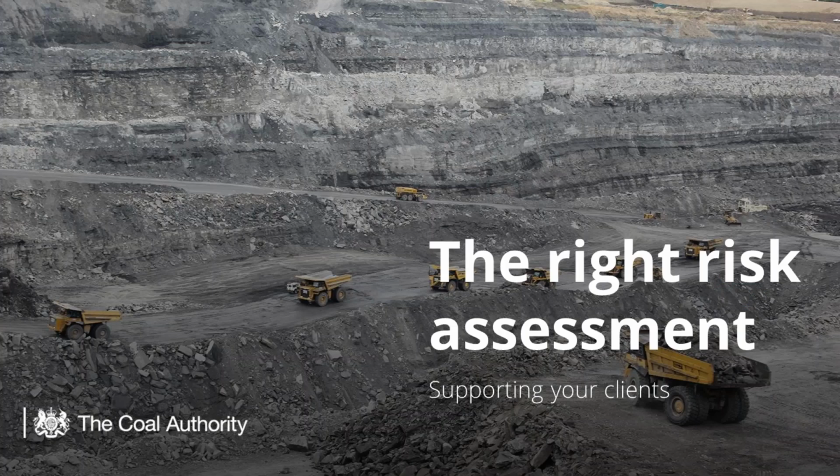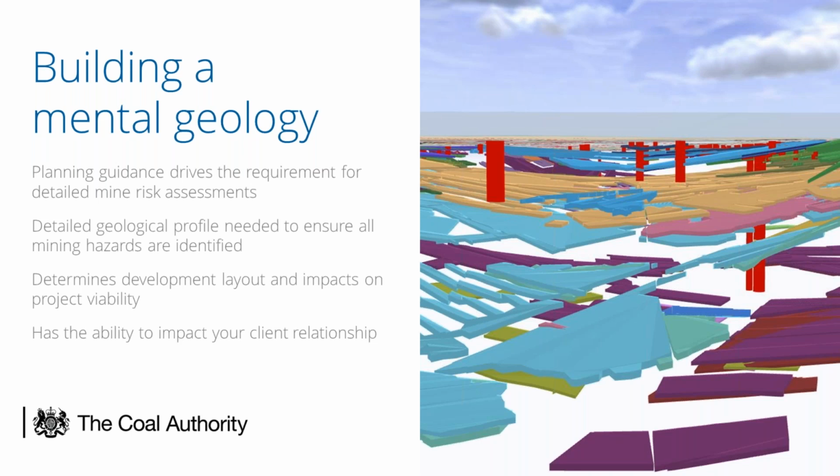Okay, so let's take a look at how you support your clients by doing the right risk assessments. As with anything like this, planning guidance drives what requirements need to be considered when looking at things like risk assessments. And under our statutory responsibilities, the Coal Authority derives this focus for coal mining risk assessments. As part of this, there'll be a key requirement for detailed geological profiling to be conducted to ensure all mining hazards within an area are identified.